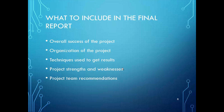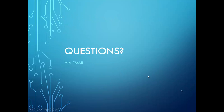The project final report will include the project summary and how the project was organized and managed. It will also include the techniques, tools, and methods used to get the required results. In addition, the project strengths and weaknesses will be documented, followed by conclusions and team recommendations for future projects. By finalizing the documentation and delivering the product to the customer, the team will have completed the project requirements and is ready to move to another project. You have successfully finished the project, achieved the goal, and it will be the moment to celebrate your success.